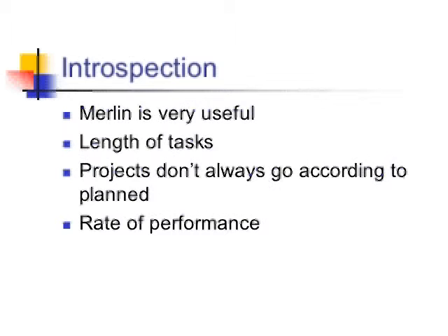I also learned that projects do not always go according to plan. Projects sometimes run longer than expected, as demonstrated by this problem. We also learned how to calculate rate of performance, which we can do by dividing actual work by planned work.